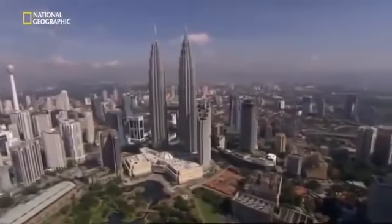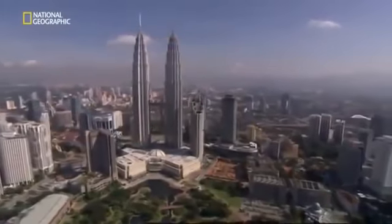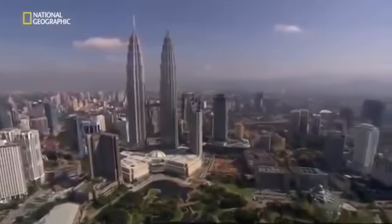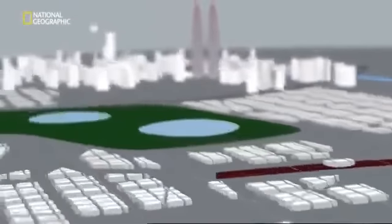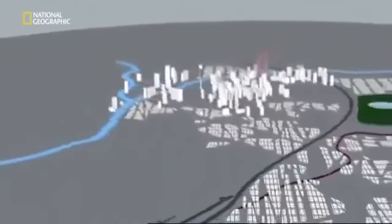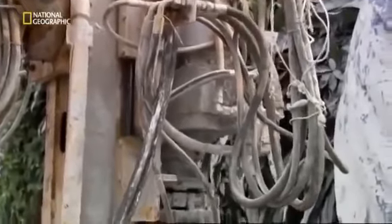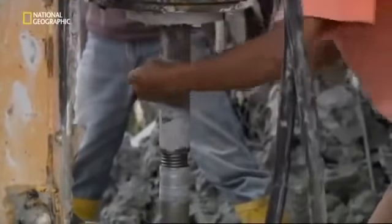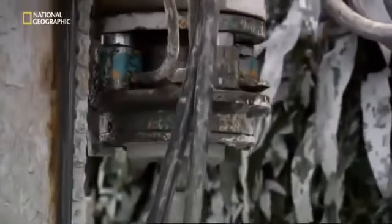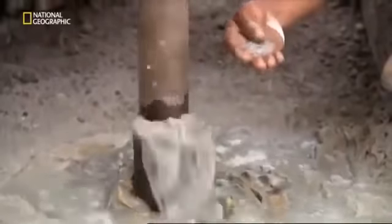The Twin Towers rested on just over 18,000 square meters of ground, an area small enough to survey completely before construction started. Smart, on the other hand, has a 10-kilometer-long footprint. Its site covers almost 7 times as much ground as the Twin Towers. Surveying every single inch of this much earth isn't an option. To reduce the risk of collapse, geologists have to probe constantly ahead of the TBMs.